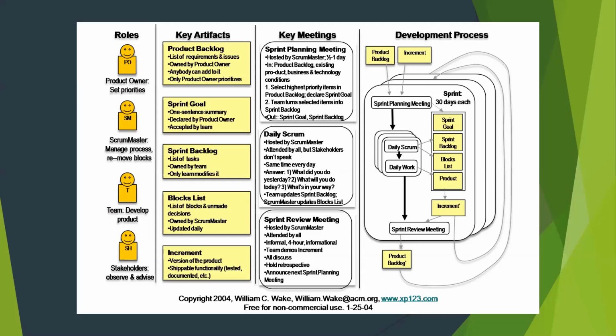Once you get to the minimum viable product, then it's up to the sponsors and the team to determine whether you need to continue to iterate. As long as it's determined and agreed upon, and there are resources and sufficient budget available to continue to iterate, you can continue iterating on subsequent sprints and delivering subsequent requirements that continue to be identified in the backlog. The project continues until basically the available budget has been exhausted, and/or the resources that are working on the team are no longer available.